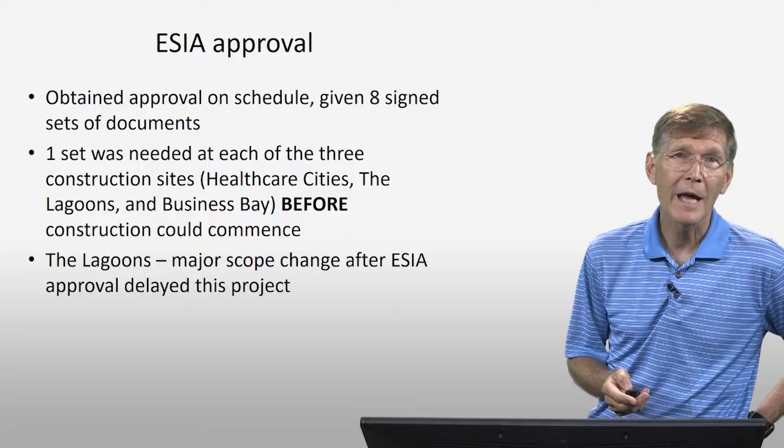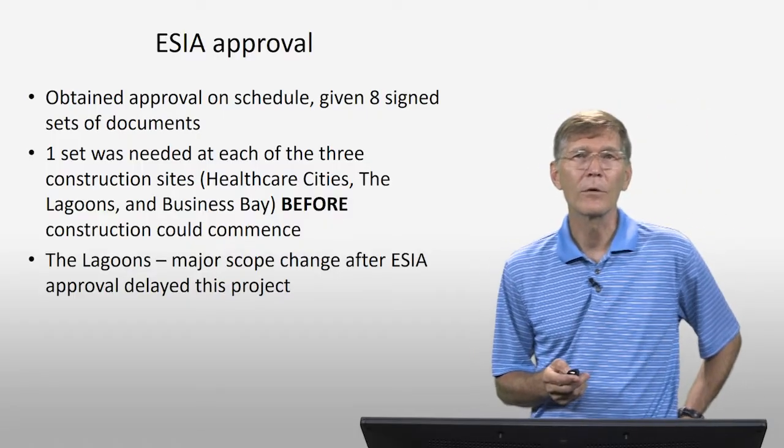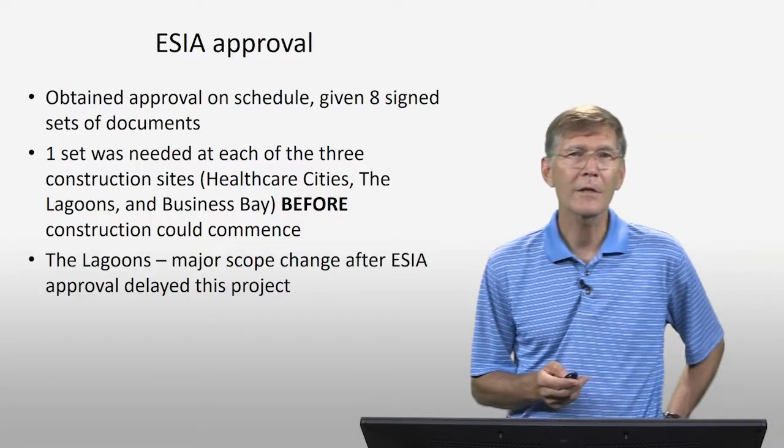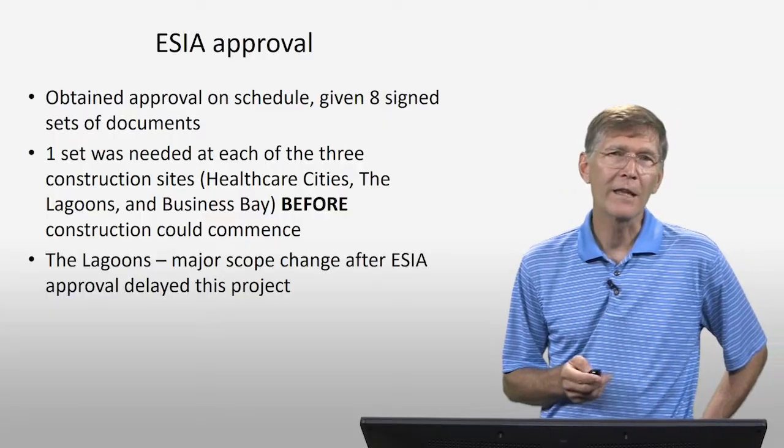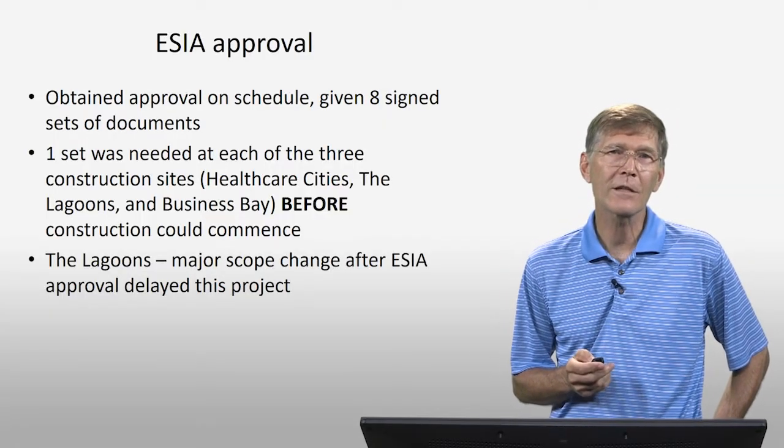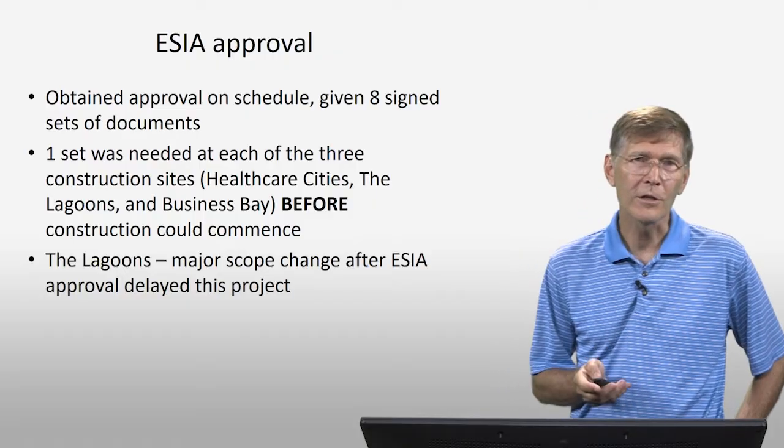So we obtained our approval on schedule. We were given 8 signed sets of documents. One set was needed at each of the 3 construction sites before construction could commence.